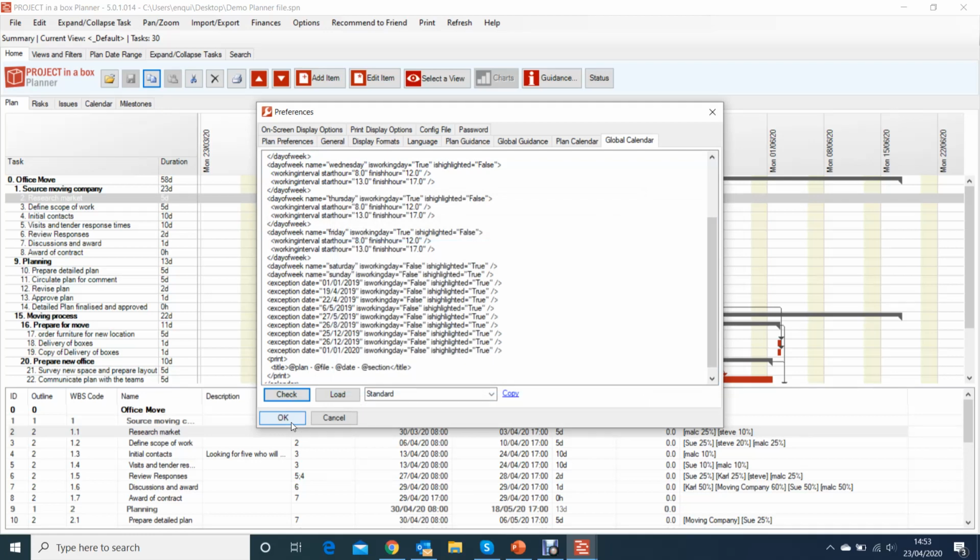Now of course really I'm probably going to want to put in 1 or 2 years ahead of bank holidays from my particular working environment. The dates obviously have to be specifically set. Some, like New Year's Day, Christmas Day, Boxing Day in the UK working calendar, can be just copied over the year like I've just done, but others fall on particular dates associated with religious festivals or the first or last Monday of a month, and therefore you have to put them in specifically. There isn't really a repeatable rule that's going to enable you to do that.